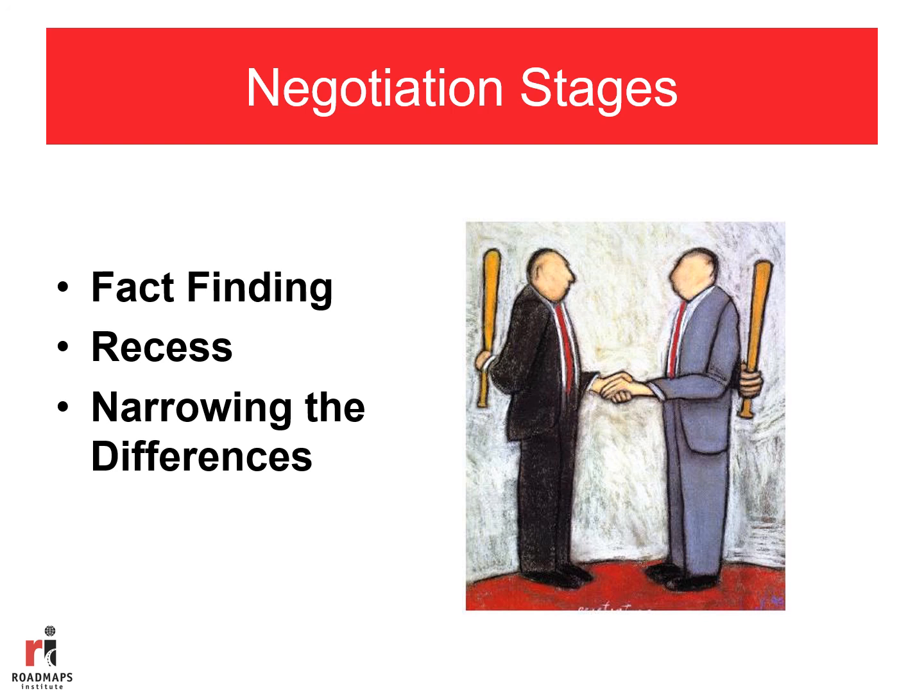What I encourage organizations to not do is move to hard bargaining. And I really do not believe that hard bargaining should be used in settling on a collaborative project charter. The reason for this is it sets precedents for the future of the negotiations for other projects. Hard bargaining itself involves the use of take it or leave it tactics, and its general use is limited to one-time or adversarial situations where long-term collaborative relationships are not an objective.